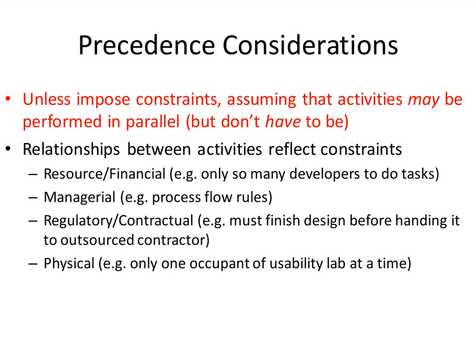Now, key to this is mapping out tasks and their dependencies. Often in modern software, these tasks are illustrated with rectangles, and the dependencies are illustrated as arrows. It turns out that these arrows encode different types of dependency, different types of constraints. Some of these constraints are logical information constraints.